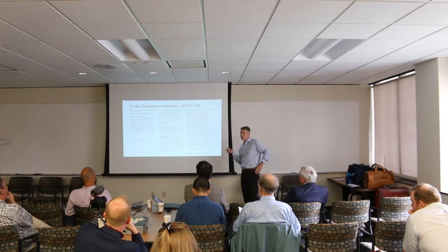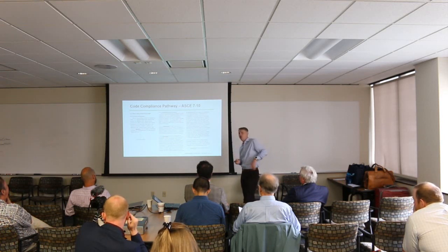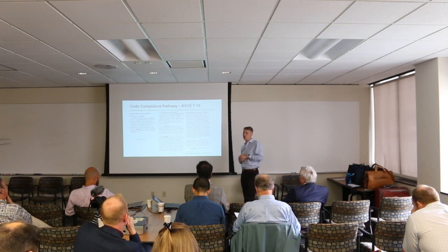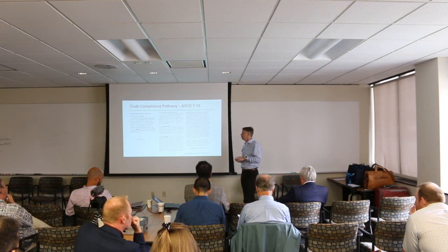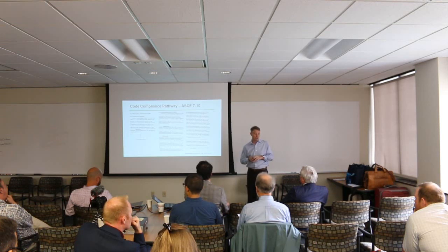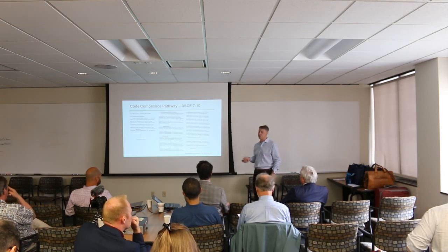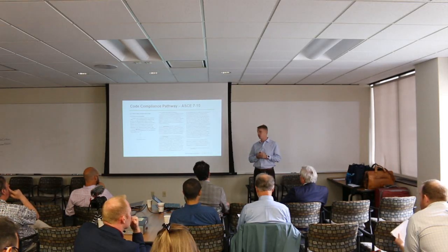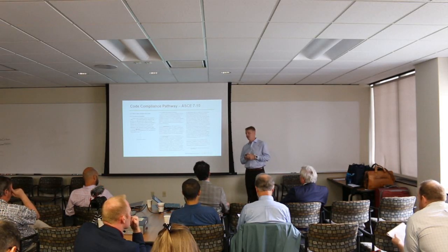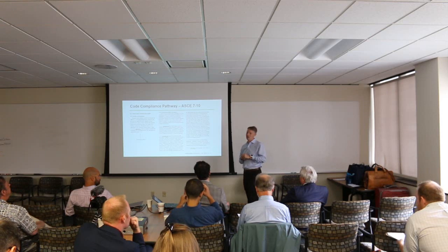And so how are we getting to these projects? How are we getting outside the prescriptive limits? It's going through performance-based design. That's where I changed the process in the state of Oregon. I went down, met with the state building officials, and basically said, okay, what does the code say? The code says you have to have a peer review. That's it. There is no requirement to develop a committee, send out RFQs, things like that.